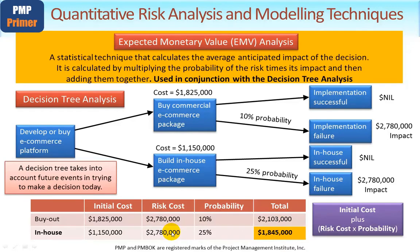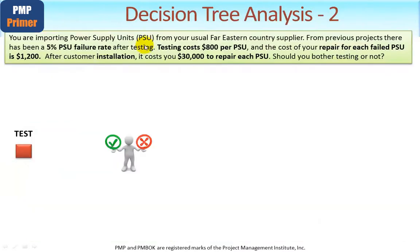Let's look at the second example, doing the math a slightly different way to reinforce this method. In this example, you're a company that imports power supply units — PSUs — from your usual Far Eastern country supplier. From previous similar projects, there has been a 5% PSU failure rate after testing. Testing costs $800 per power supply unit. For the 5% that fail, the cost of repairing them — because it would be too expensive to send them back to the Far East — is $1,200 per failed power supply unit.